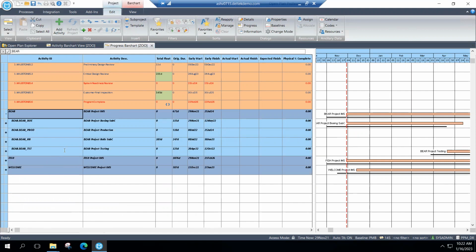Now, these sub projects, as you could see when Jared was loading projects, might be in a variety of different project scheduling tools, because I don't necessarily have control over what folks are using. So some of these subcontracts might be coming to me in an MPP, an XER, an Open Plan BK3 file. I have the ability to manage everything all in here and bring in those updates as they come in, and in this case, get accepted for review via Touchstone.